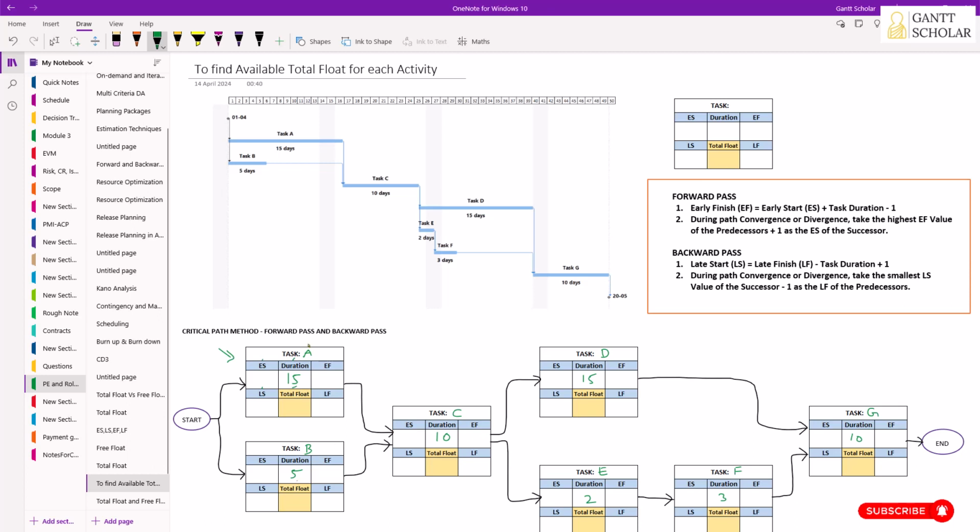Okay, I've already provided the name of each activity in the block. Also I captured the duration of each activity. For example, if we take activity A, 15 days duration, I've captured that here. And we also captured the dependency of the activities. For example, activities A and B need to be completed to begin activity C. So we have captured that here. And we are starting both activity A and B on the same date.